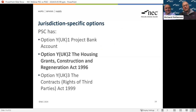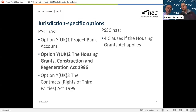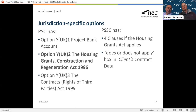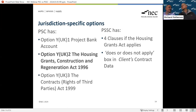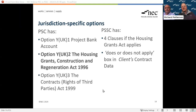The PSC has options with UK-specific clauses. In the short contract we don't deal with one or two of those, but we do have a clause relating to the Housing Grants Act. There's literally a box in the client's contract data to say whether or not that applies. If it does apply, there are four clauses right at the back of the document that put those words into your contract. You do need to think very carefully about whether your contract falls within the definition of a construction operation.